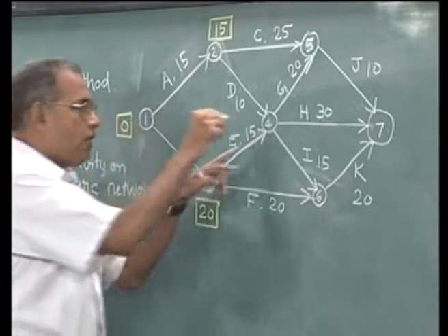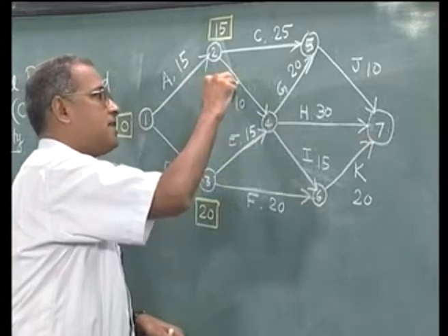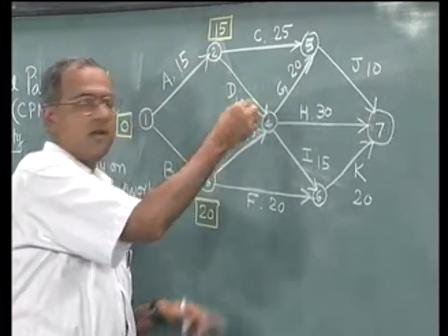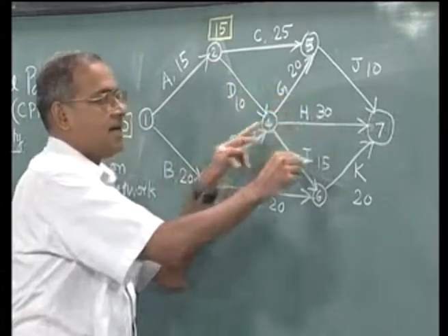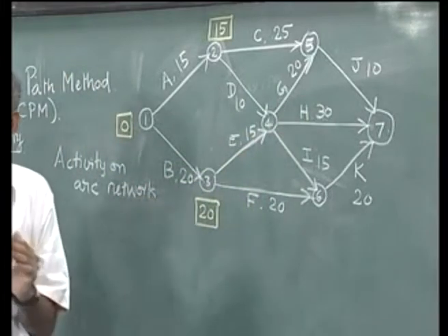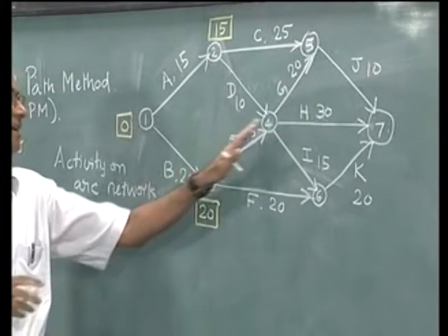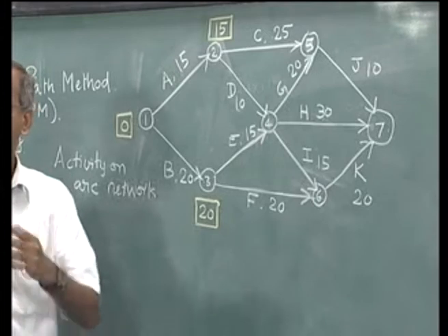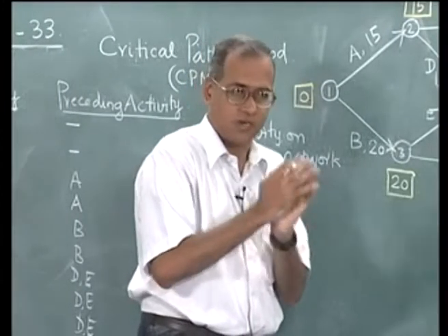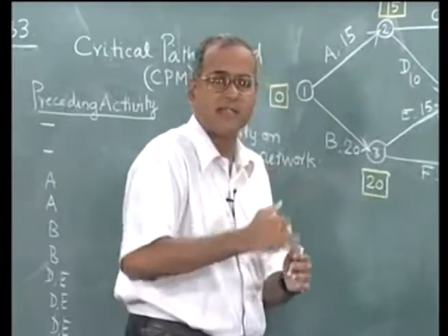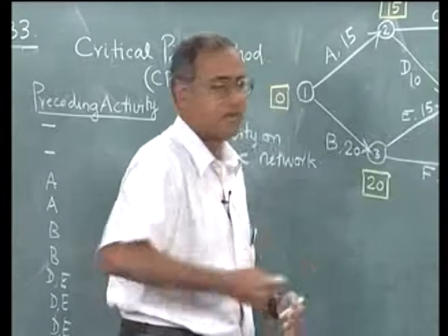But now, here 4 represents an event where actually both these are completed, so that G, H and I can begin. So, it is not about when earliest can I reach 4, it is more about when latest I will reach 4, such that latest in the sense to minimize that late quantity.